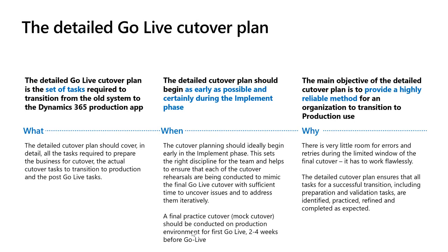The rule really you should be going by is, I don't want to be doing anything at the final go live cutover that I have not practiced and got right before. Right? The risk otherwise is too high.